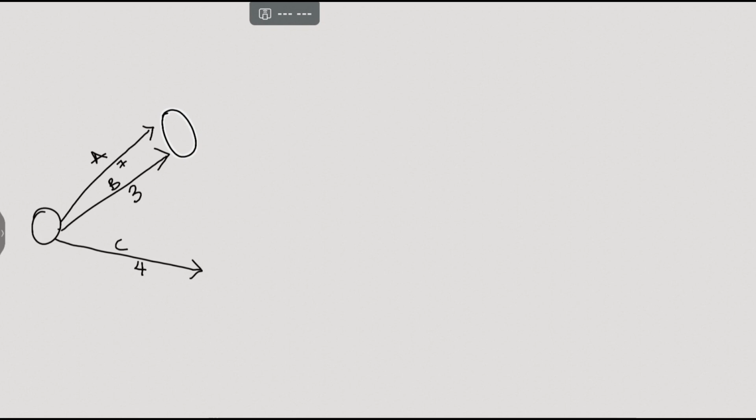Then there are 3 activities that do not have a predecessor, which is A, B, and C. So this is A, B, and the values were given as the mean values we got: 7, we got 3, we got 4 for C. Then D precedes A, so we can have D. E precedes A and B, so you can also have E.